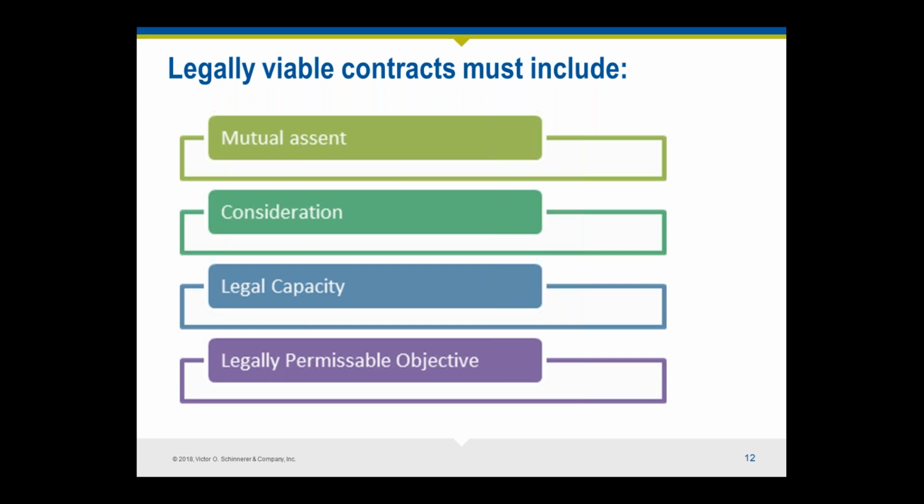So let's take an example where perhaps you're meeting with a client. You send a contract to the client, you start working on a project, but the contract's not been signed. Is there acceptance? No, there isn't. What if the client starts paying you? Then is there acceptance? Maybe. Or as I like to say, the answer I hear from a lot of attorneys when I ask questions is often, it depends.